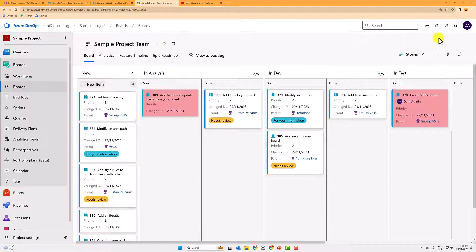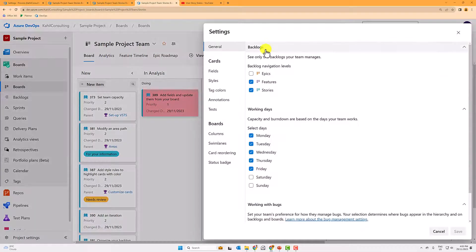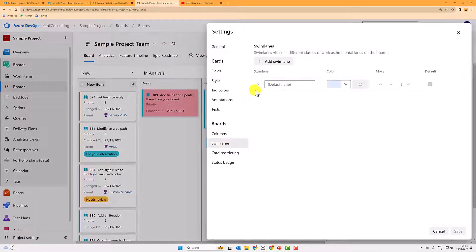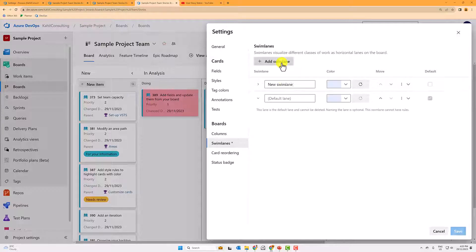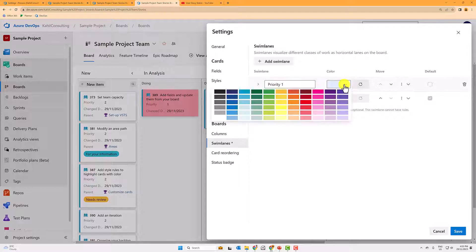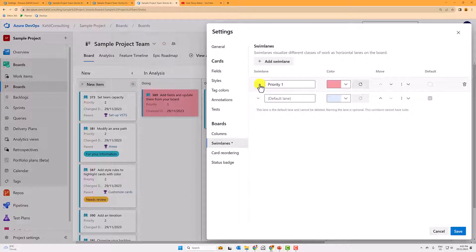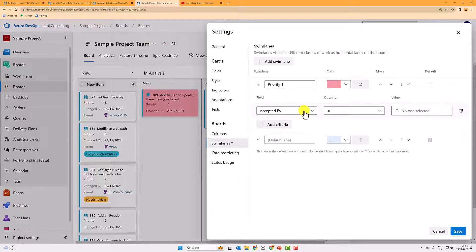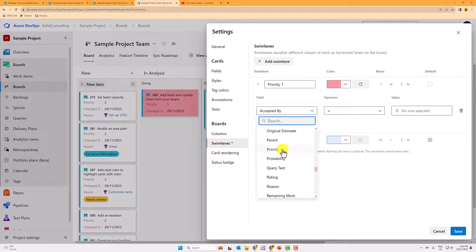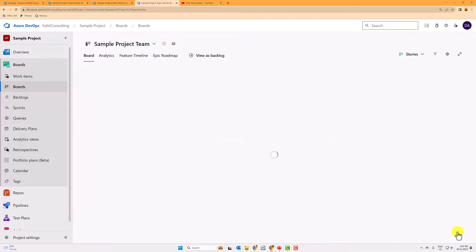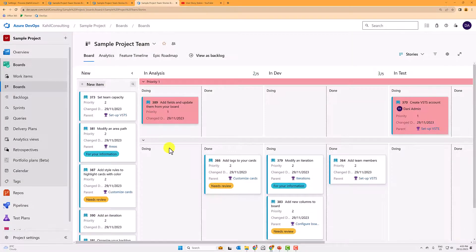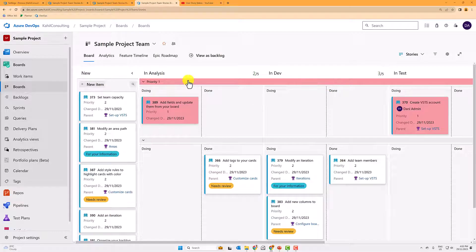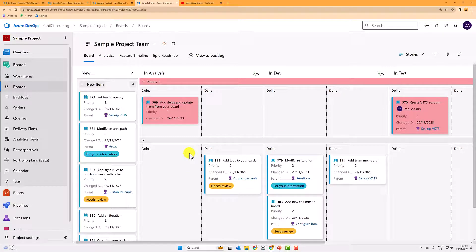And another item here that you can tweak is effectively, you could in swim lanes, add an additional swim lanes, maybe for your P1s. So if we say priority one, and the color is actually red, and you have to add a criteria. And again, this is your P1, priority equals one. So once you do that, you will see an additional swim lane with all the user stories that are in priority one, so that you can easily focus on those user stories as a priority, and then you go look at the other user stories.